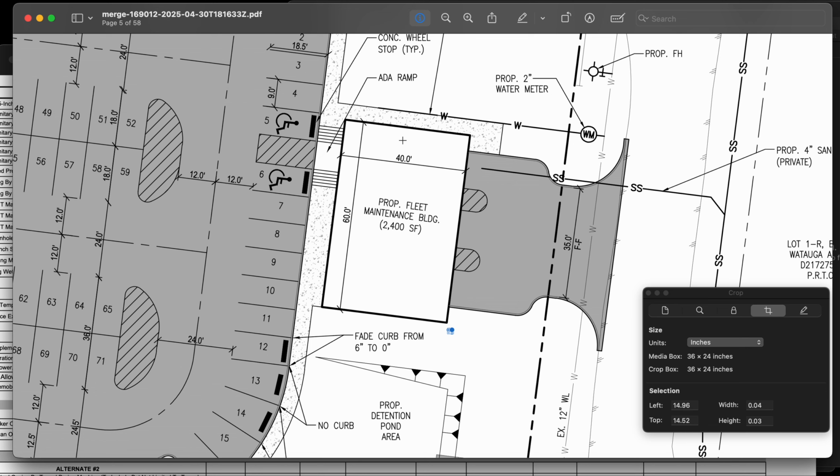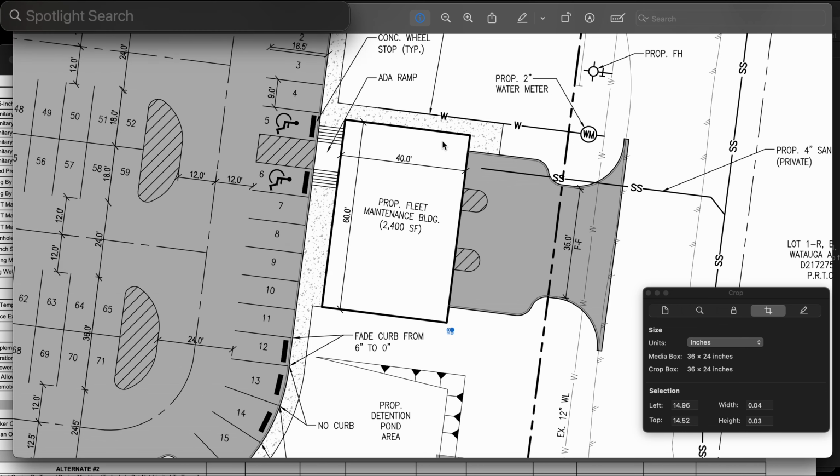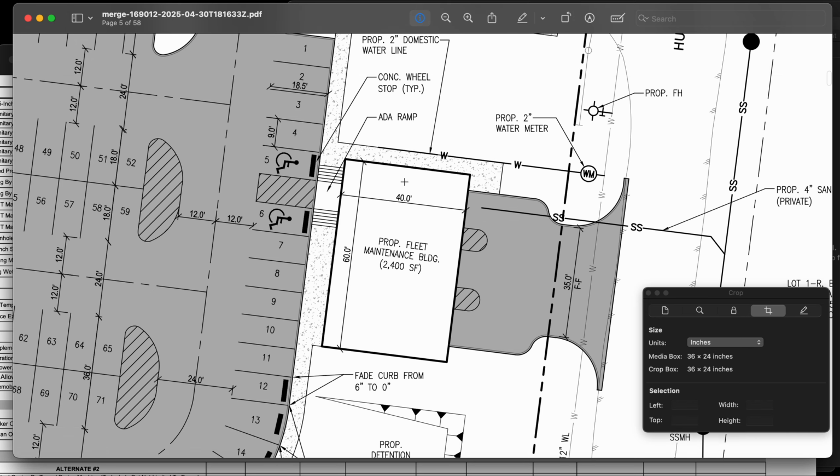Say it's going to be $800 a load, imported, compacted, and spread out. Okay, so it's all under one line. And the reason why I like to say that is because that includes all of the select fill, and you're not breaking it down into separate categories. It's just one straight, sweet number. So if we're looking at 35 times 800, we're looking at $28,000 in select fill. That is what I am looking at for this.